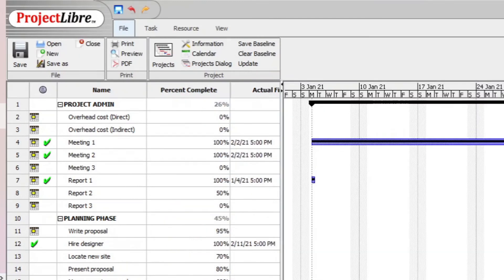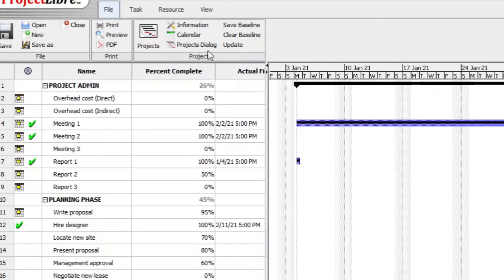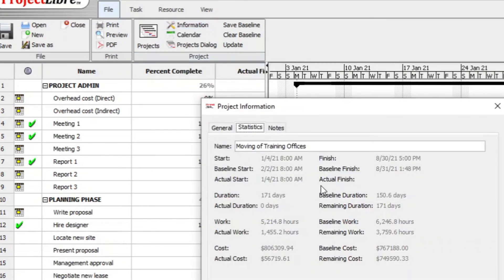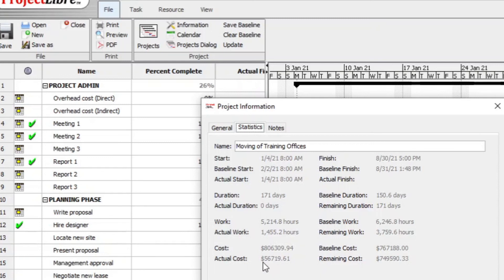In order for the data to register, you sometimes have to just exit Project Libre and then reopen the file. And if you go now to file, the project dialog box here and you go to information, then you will see on the statistics tab, general tab, statistics, notes, statistics tab. There you will see the actual duration, but also the actual work is 1455 hours. And then also the remaining work and then the actual costs involved is this amount.